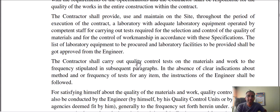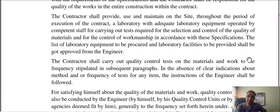The contractor shall carry out quality control tests on the material and work to the frequency stipulated in the subsequent paragraphs. This covers material quality control tests and the required testing frequency as per the specification document.